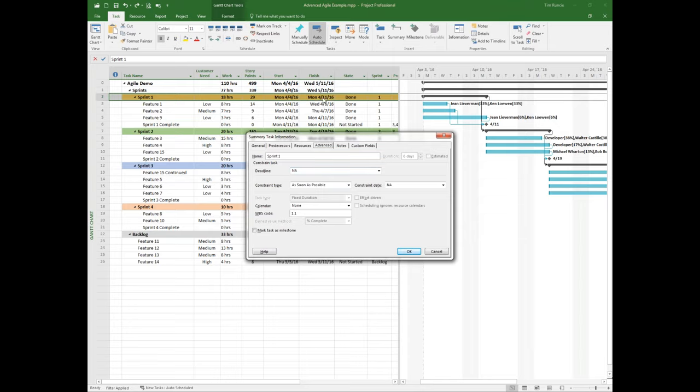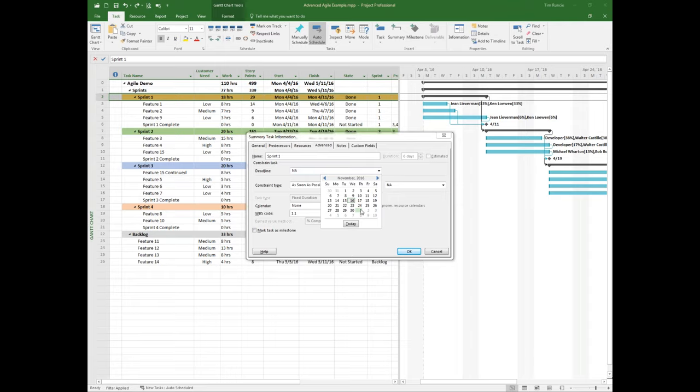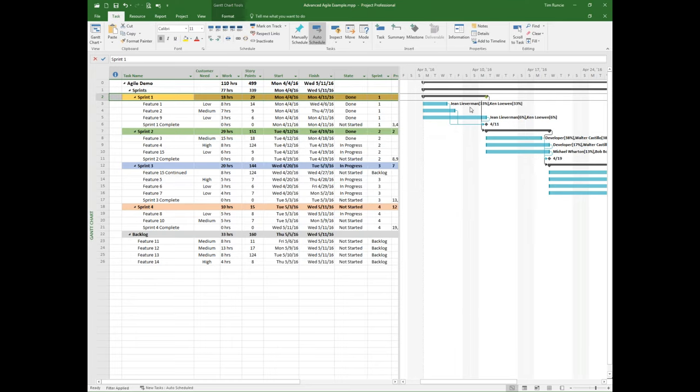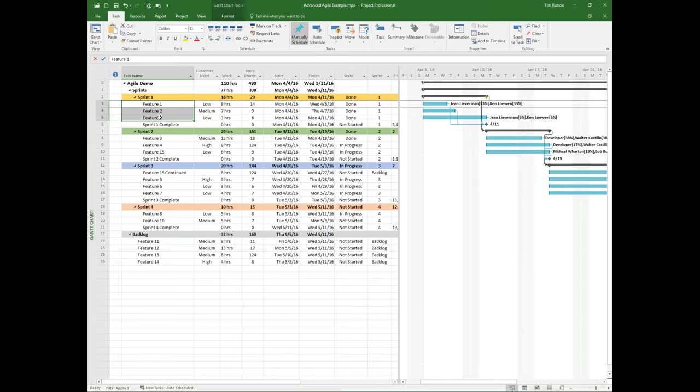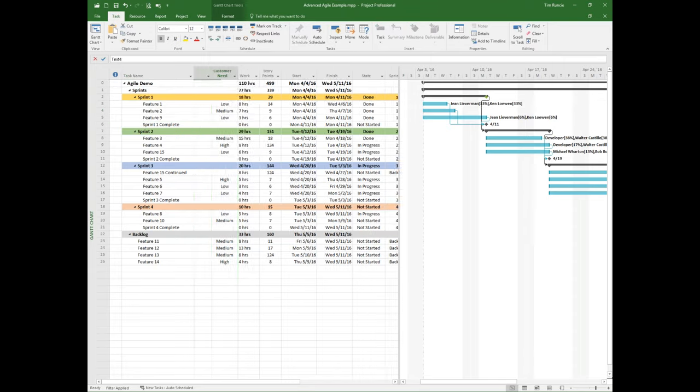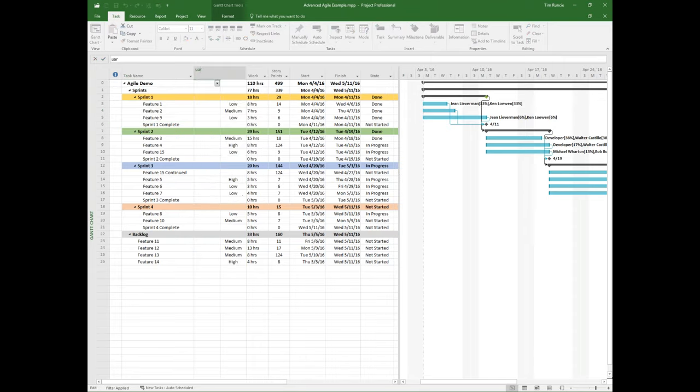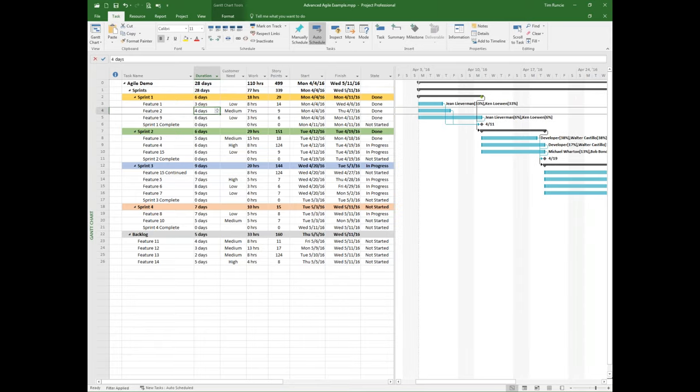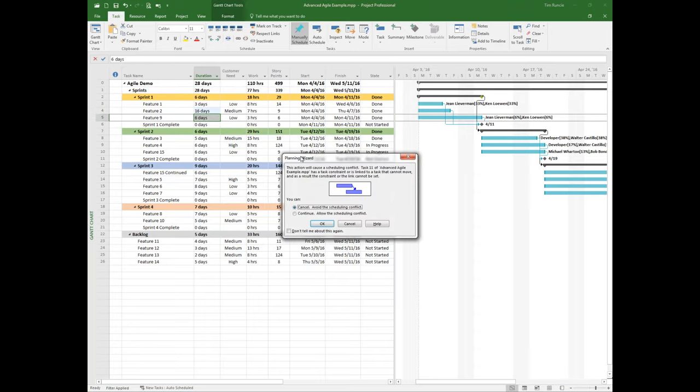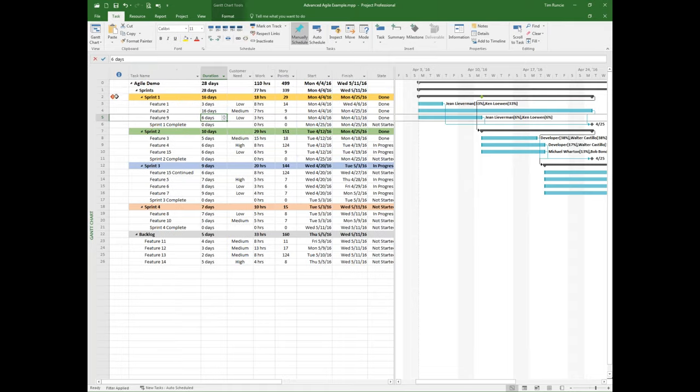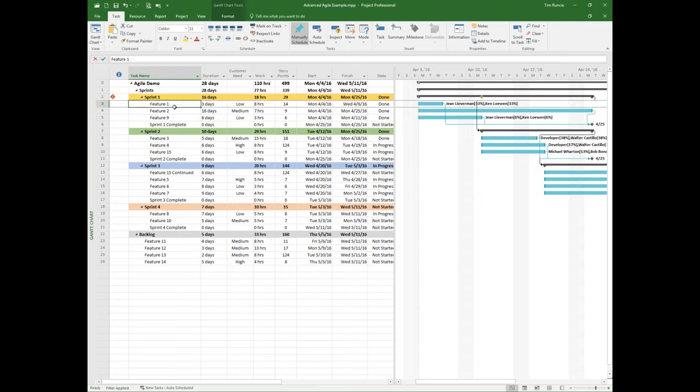And part of that is whether you want to use a constraint or my favorite is just to come in and assign a deadline to the end date. So if I say, this is a week-long sprint from Monday to Monday, I may just want to have a visualization that says when I come in here and I'm working on this, I want to say if it slips beyond that week, I need to know about it. Now you can see here I've got a deadline. And as the team is either timesheeting or progressing or telling you how many hours are remaining, if for any reason somebody comes in and says the remaining amount of time for this is not four days, it's going to be 16 days, and we hit enter. Well, you certainly can turn that off. The other part is you want to know in a planning perspective if you're going to see if that might be slipping.